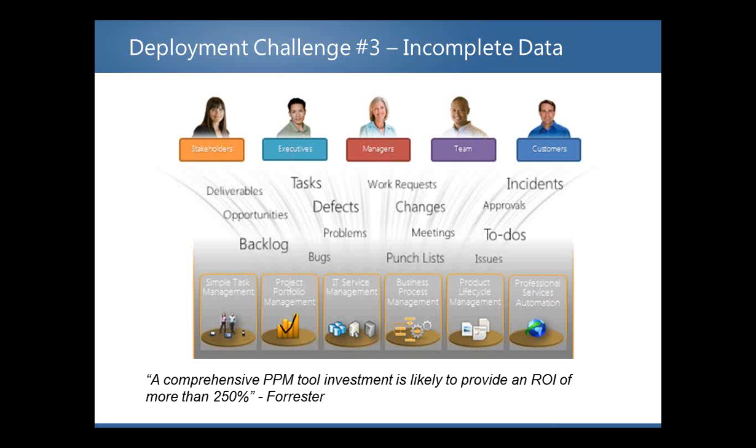One of the things that we see commonly is that maybe an organization will say, only projects that have over a $500,000 investment should be included in the tool. And again, that can be a point of failure because you won't be able to see the overall picture of your full portfolio. So again, projects are everywhere. So are the resources running those initiatives. Visibility into all your investments is critical in understanding the true health of your portfolio.